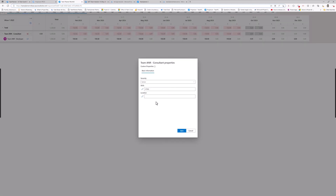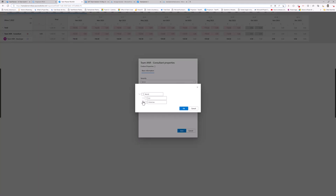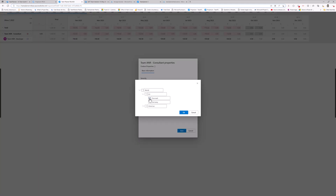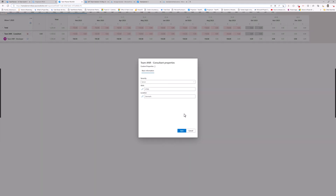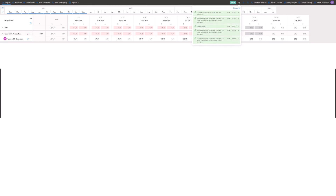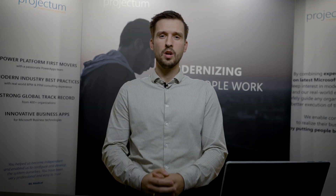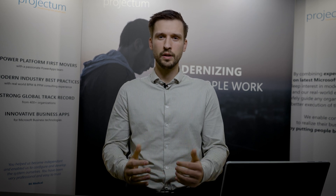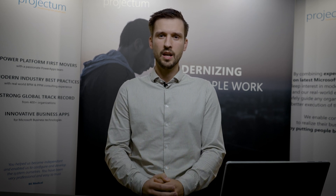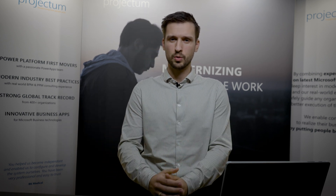This ensures that when the line manager receives the request, he or she can go in and see what is needed for the project manager to fulfill this request. The line manager can take the decision whether he or she has resources that actually fulfill that need. If not, they are once again able to forward the request.